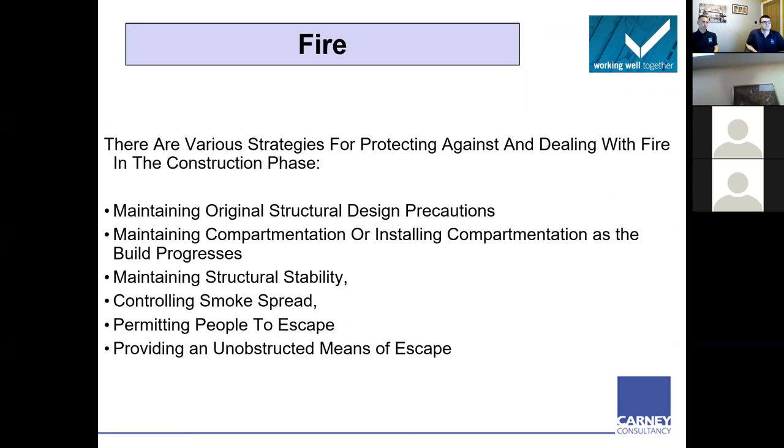So various issues. Maintain the structural design precautions. Again, I got involved with a construction phase plan. It was replacing the fire doors in sheltered accommodation. About 20 doors to change, and it's a case of being really clear with the site manager and the joiner. You're taking off one at a time. The joiner isn't taking all 20 doors off and replacing them one by one after that. No, he's got to take one off, put the new one on, one at a time.